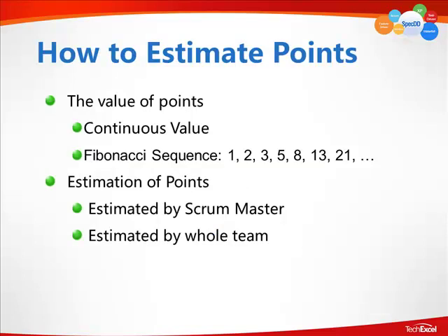Now, how do we estimate points? Point values are different for every team. The most basic functionality could be just a simple continuous value. This is worth 1 point, this is worth 2 points, this is worth 3 points. It could be based off of the Fibonacci sequence, where the accumulation of the previous two represents the third. So you have your 1, 2, 3, then you have your 5, 8, 13,